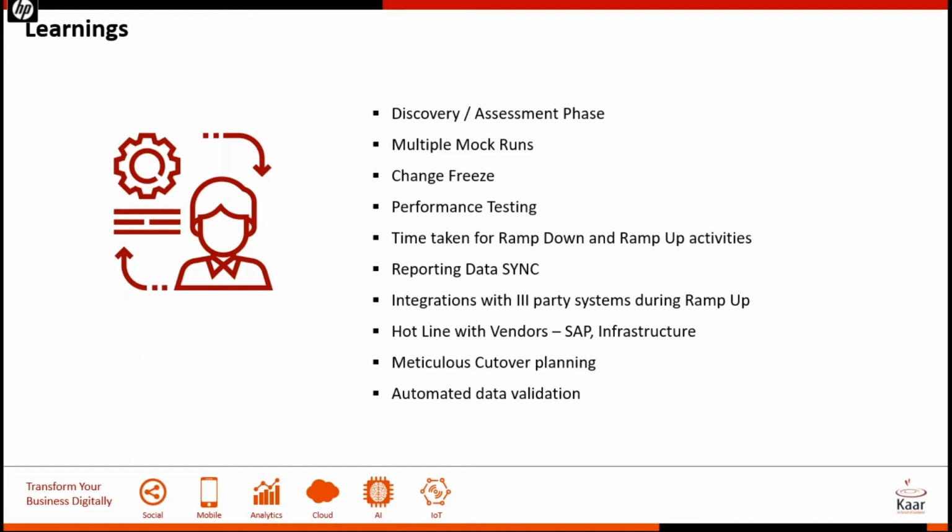The third one is the change freeze. So why would you need the change freeze? Let's say you have an ECC landscape, dev, QA, prod, and life is going on as business as usual. And now you've started an S4 conversion project. So you've taken a copy of production and put it in dev S4. Now let's assume fixes that come in production will have to be done anyways. You cannot stop those. But you don't want any new changes coming into your ECC landscape, for 2 reasons.